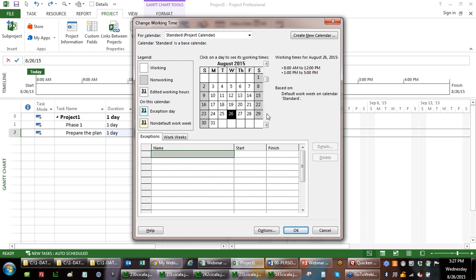So we do not suggest using the default, because here's what the default is. How many people are working on September 7th? I'm not going to put a poll up there. I'm going to guess that most of you are going to be celebrating Labor Day on September 7th. You can see project has defaulted this as a productive work day. Be careful. If you schedule 40 hours this week, project's going to let that work be committed for that week. And I can show several other examples around, for example, Thanksgiving, Christmas, New Year's Day, 4th of July, on and on.